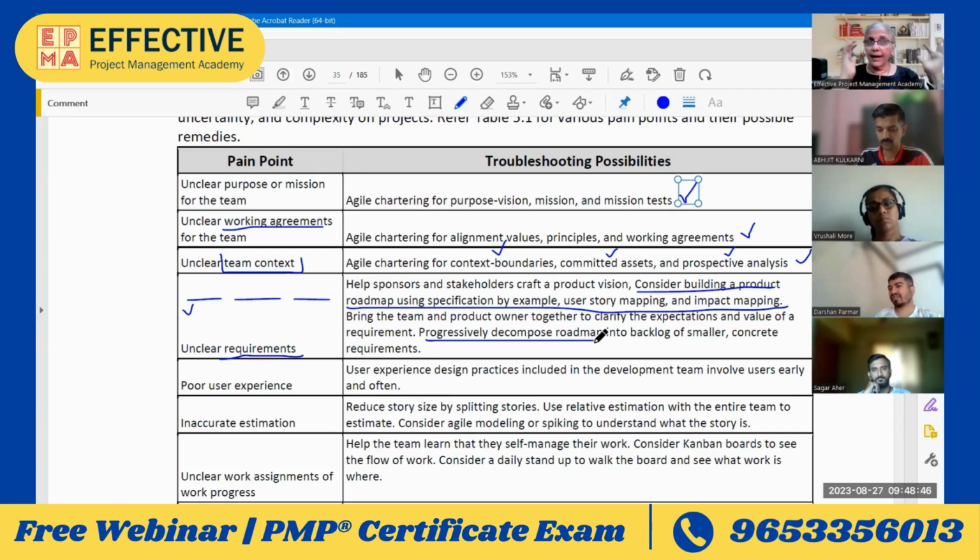detailing out, see, high level roadmap should be ready so that the team gets good idea, but don't get into detailing out. Just let the roadmap be at the high level and the current portion of the roadmap decompose it in the detail so the team understands the current work in detail. They also get the perspective for the entire product.